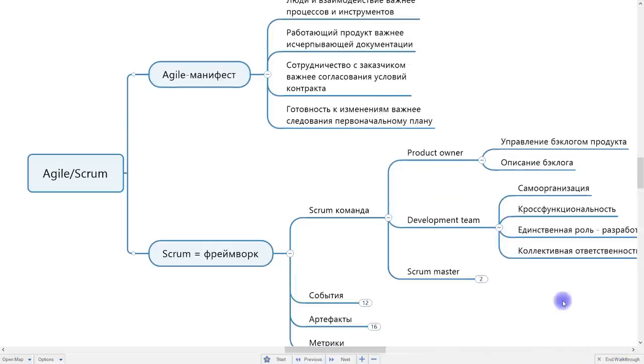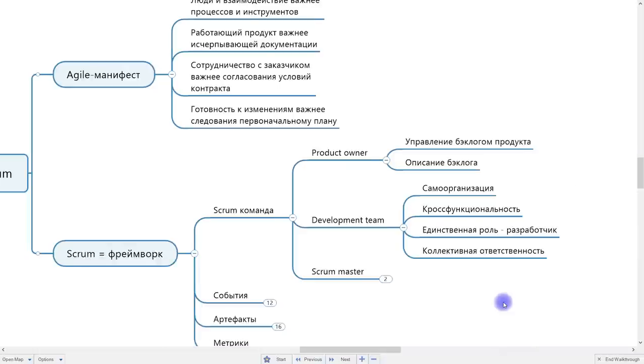The next link is the development team. Usually, we have about 3 to 9 people in the development team, so we don't need more than that. We don't recommend including more people in this development team because the more people we have in our team, the more we have dispersion of attention, and our team ceases to be as flexible as it would be if the team was much smaller. So what should be emphasized about the development team? The fact that this